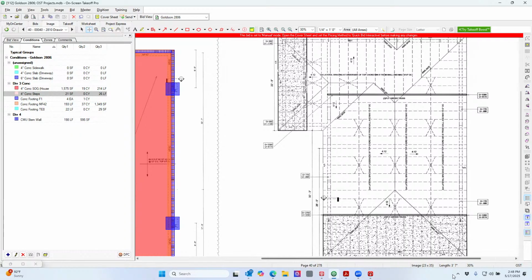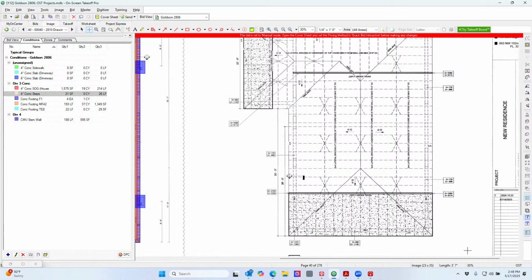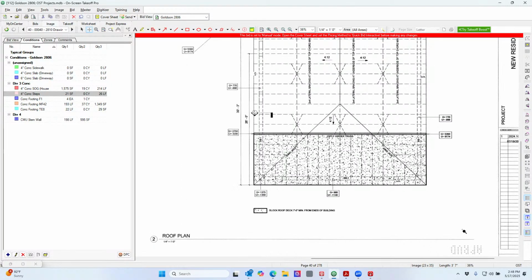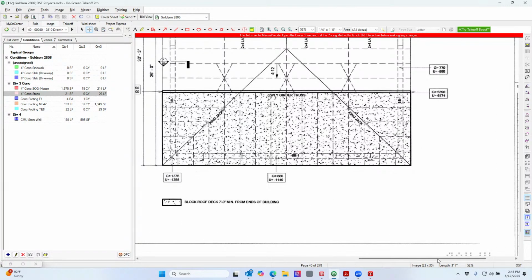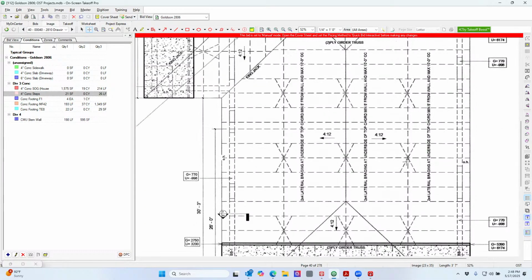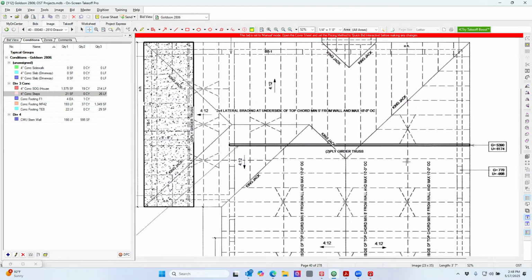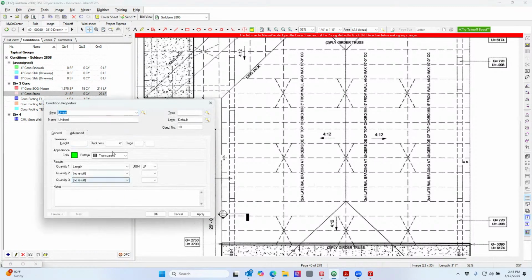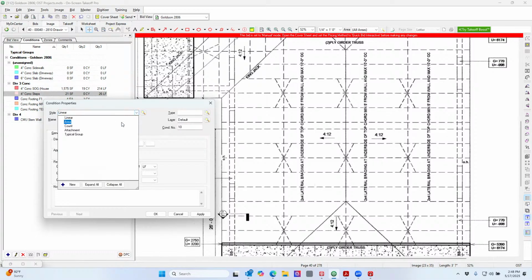So I know some of you all were asking about trusses. Again, I'm going to just take the overall square footage for trusses. If you are a truss company, I will come in here and do a count for each truss, because you're going to factor how many trusses you can install in a day and what your crew size is. So now you're getting into the details. Well, I'm a GC. I'm hiring all that out. So I'm just going to take it off by square foot.